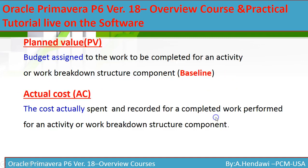We start with Planned Value. Anything planned comes from the baseline. Planned Value is the budget assigned to the work to be completed for an activity or a work breakdown structure — from your plan, from your reference of measurement, which is the baseline.